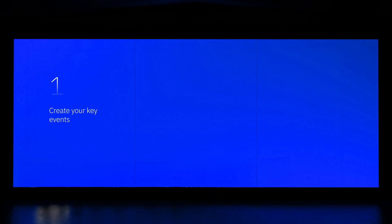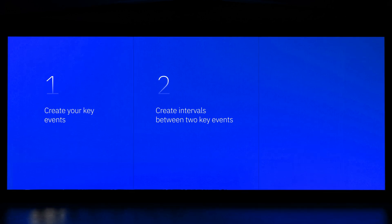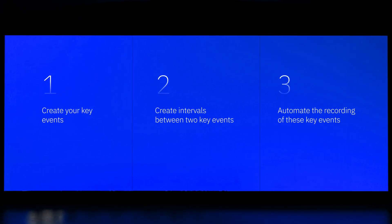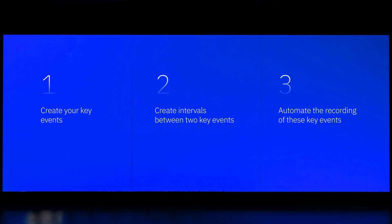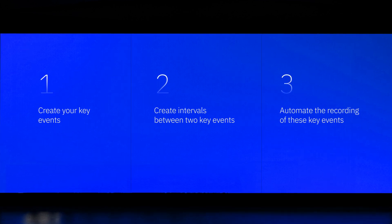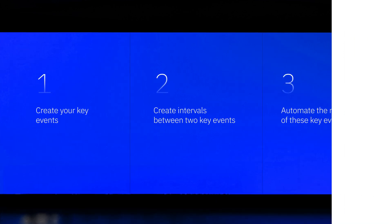You can set up key events and intervals in three simple steps. The first step is to create your key events. The second step is to create intervals between two key events. The third step is to automate the recording of these key events. Let's consider an example before proceeding to set up the feature.